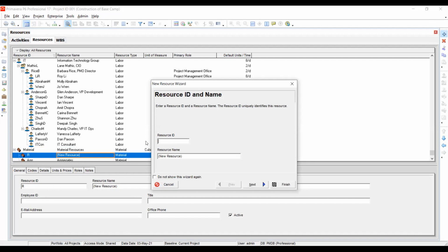Anyway, those are costly resources. It depends whether your company is hiring or it owns. Because a grader is not a material. It can be assigned work. It's not part of what goes on the road. It just does the work. But under material, you put the things that go there, maybe bitumen. So let me just stop on this. Then we go and see how we can assign it.